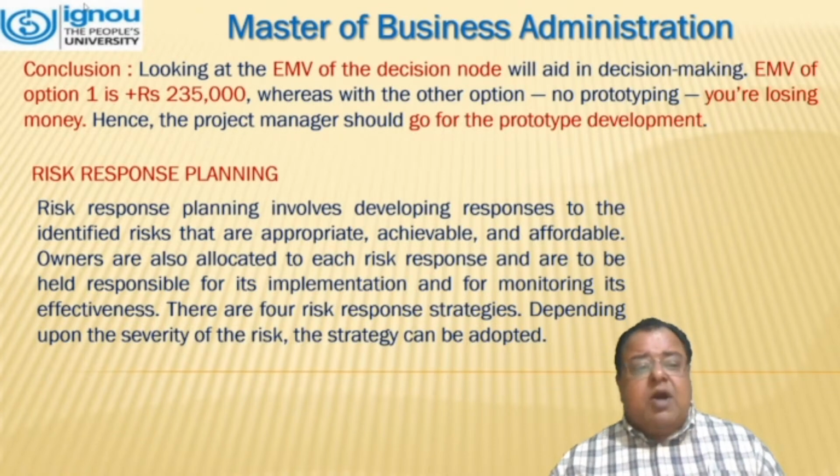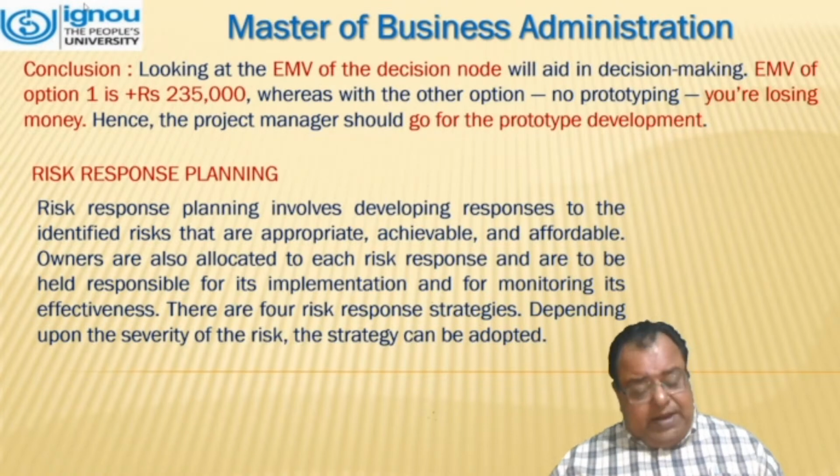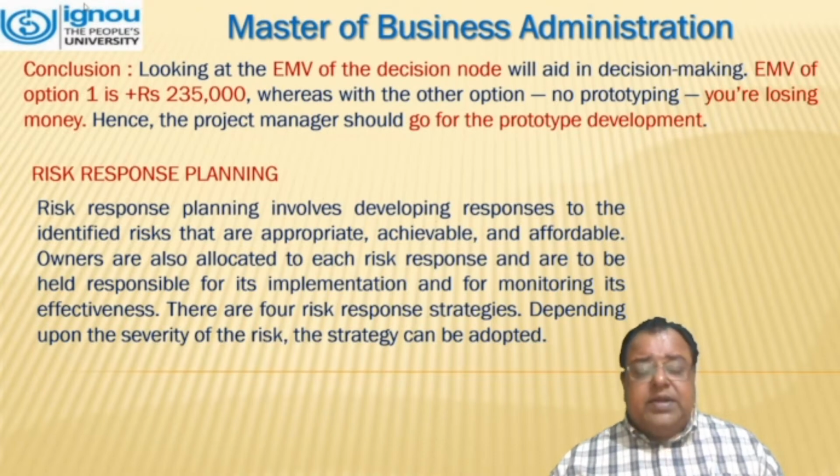Moving further, we talk about risk response planning. Risk response planning involves developing responses to the identified risks that are appropriate, achievable, and affordable. Owners are also allocated to each risk response and are to be held responsible for its implementation and for monitoring its effectiveness. There are four risk response strategies. Depending upon the severity of the risk, the strategy can be adopted.